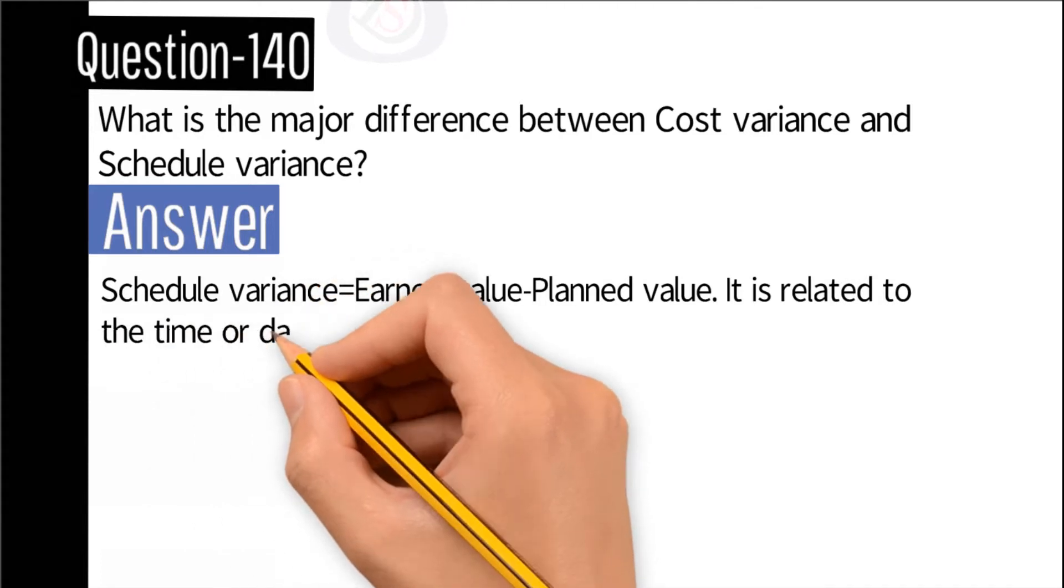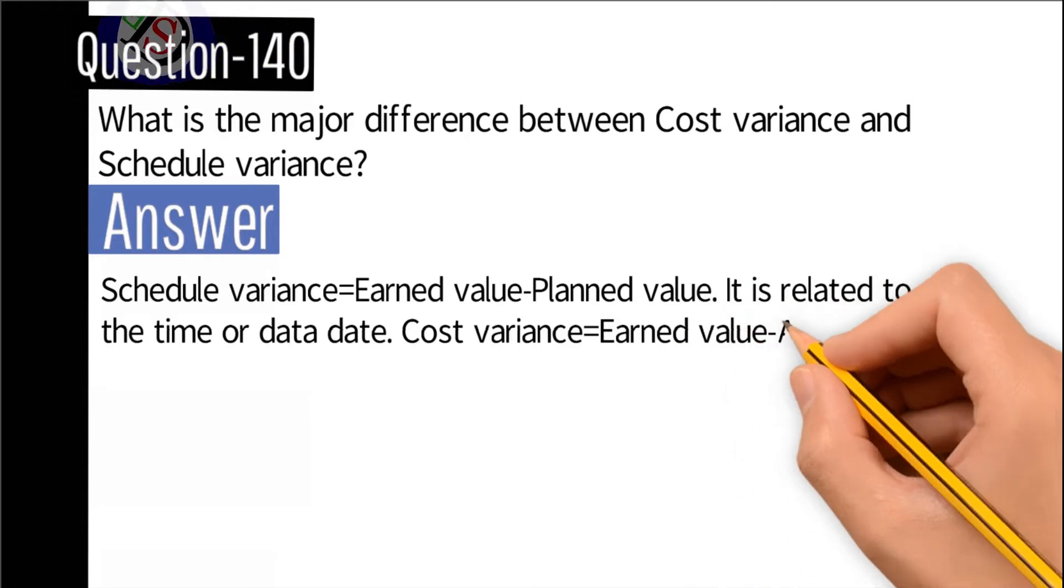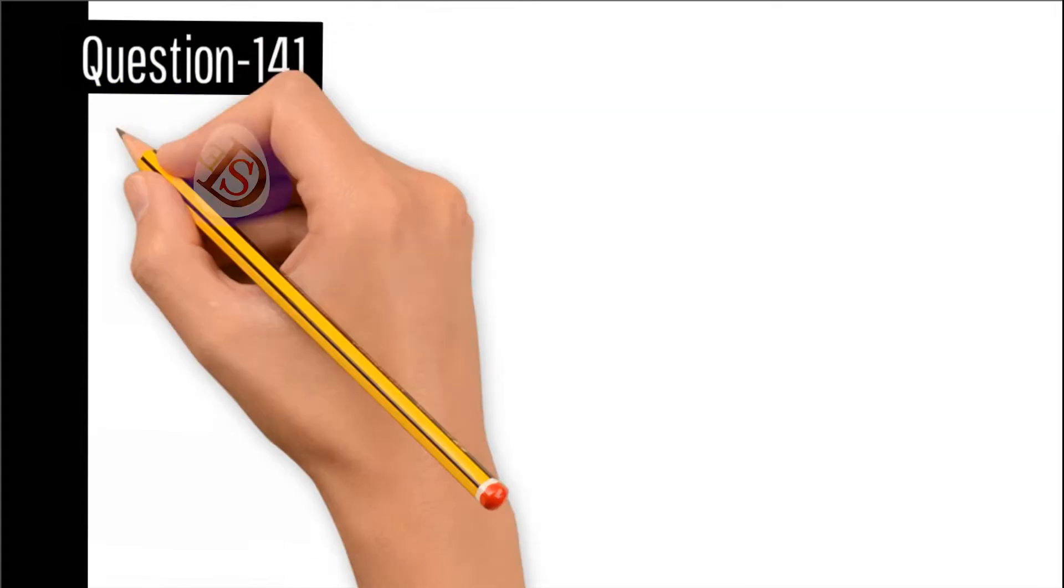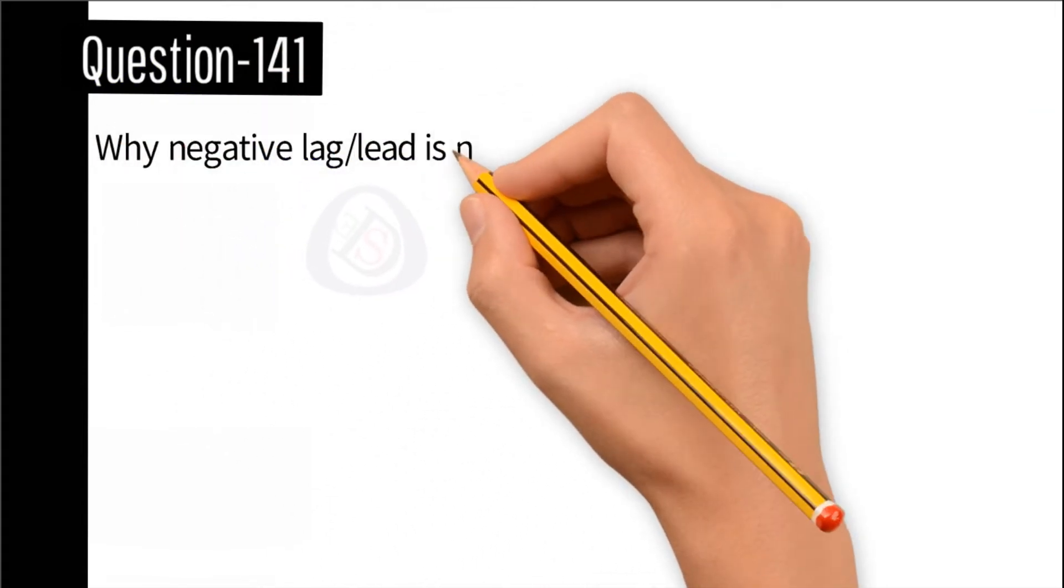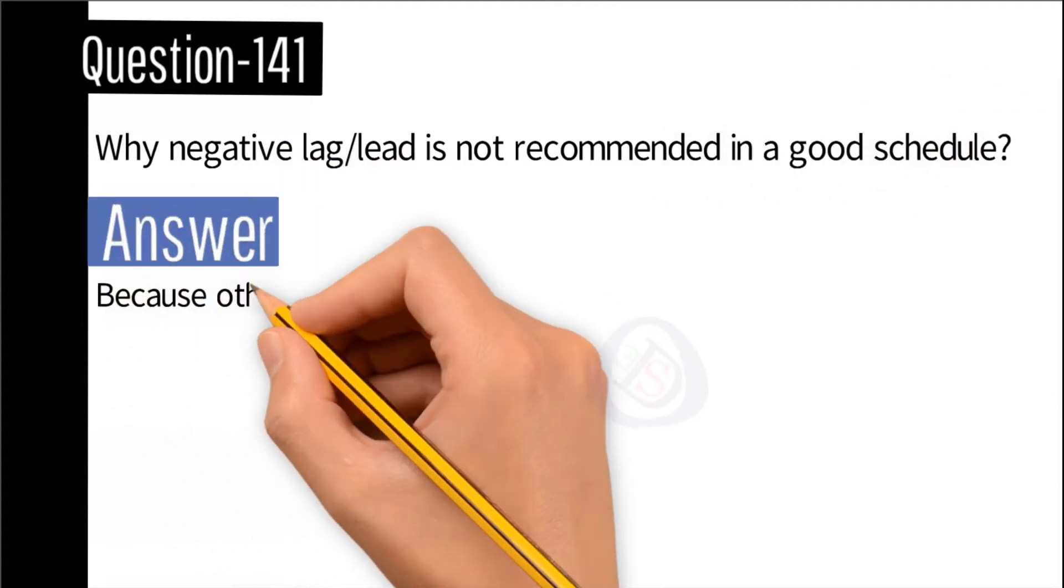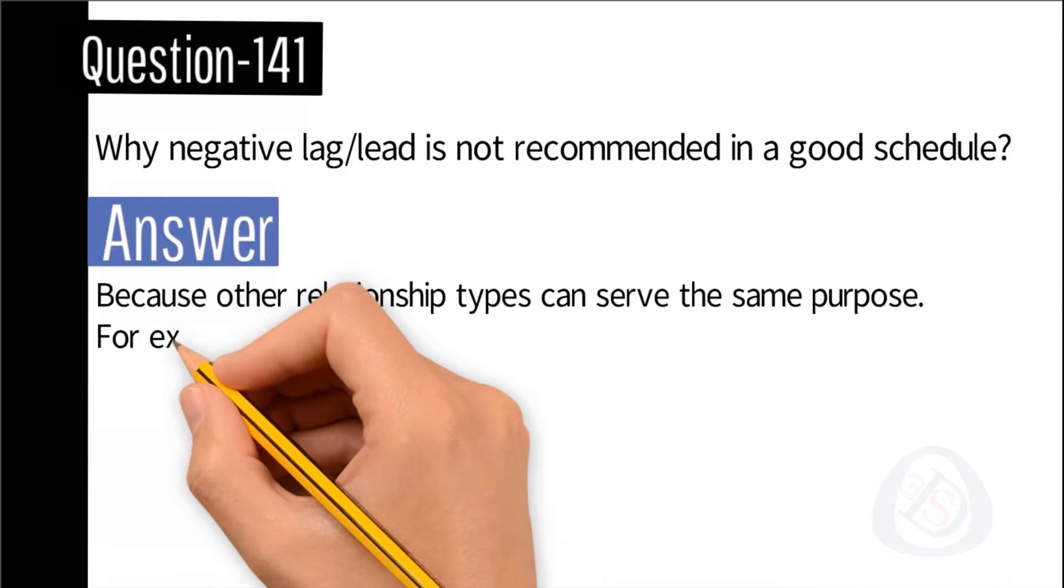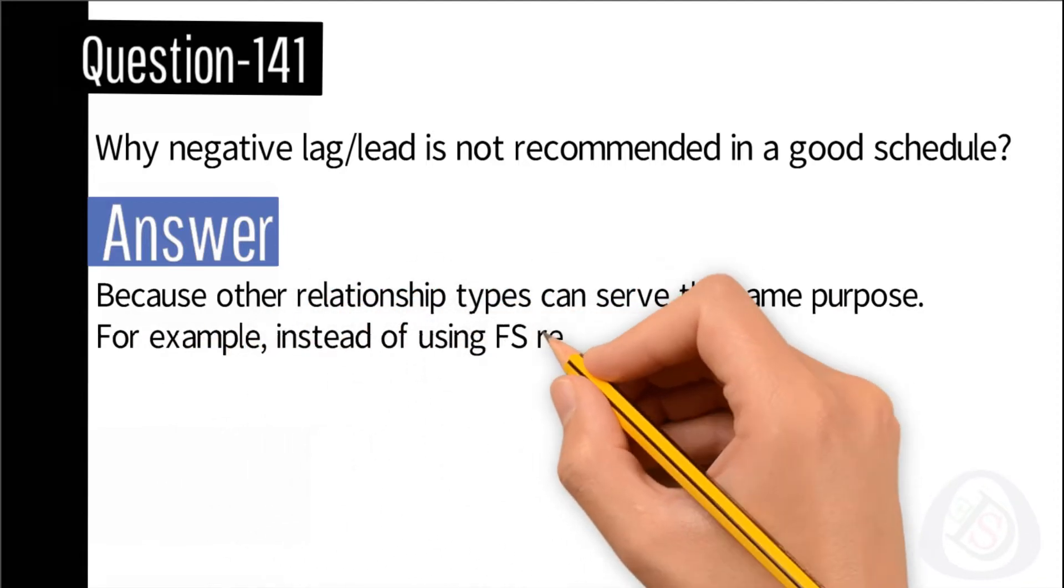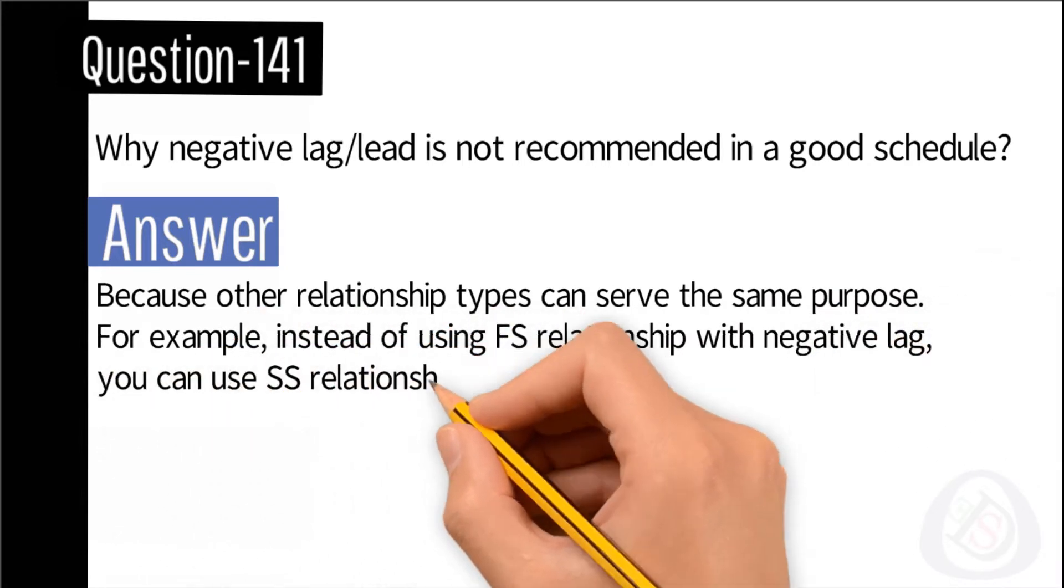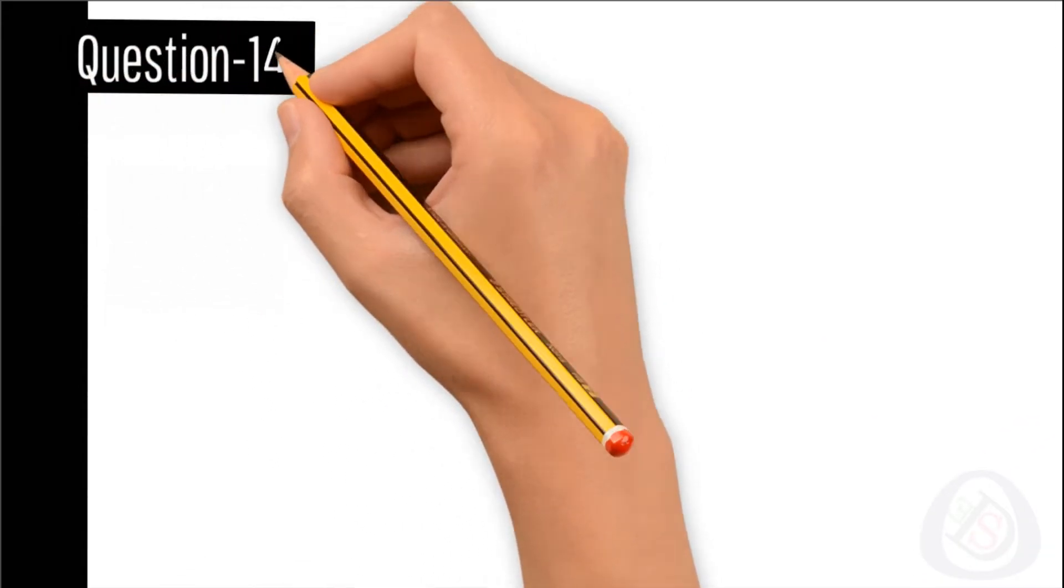Question number 141: Why is negative lag or lead not recommended in a good schedule? Answer: Because other relationship types can serve the same purpose. For example, instead of using FS relationship with negative lag, you can use SS relationship with positive lag.